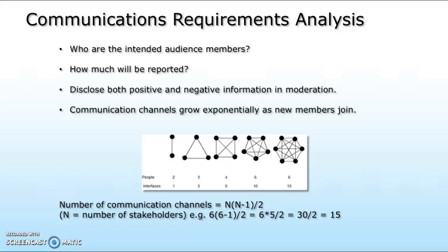The number of communication channels increases exponentially as the number of stakeholders increases. In practical terms, this means that there is an inherent tendency towards complexity of communications on a project as the number of stakeholders goes up, and it is important for the project manager to limit the complexity by introducing a communications plan that gives enough information to stakeholders, but not so much that they are inundated by information that may not necessarily be needed. Another critical key element.